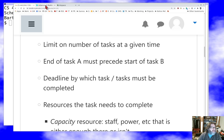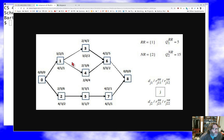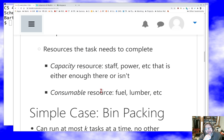We might also have deadlines, either for the whole problem or for specific tasks. Sometimes we're not actually totally trying to find a minimum length. We're trying to find a length that meets a deadline, which might be an easier problem if the deadline's fairly loose. So that's common. And like I say, capacity resources are very common. Ones like people where it's the amount of them you're using at any given time. There's also the possibility of consumable resources, resources that you use up and that won't be replenished till later. I haven't worked on those kinds of problems so much, but they are definitely a thing that matters in a lot of industry applications. But certainly it's common to have capacity resources and precedence resources as a thing.